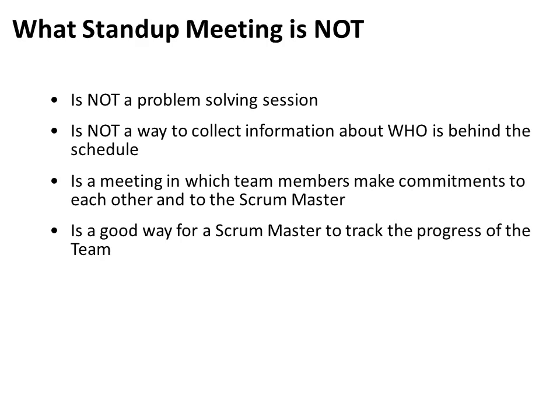So we talked about what a stand-up meeting is, but let's talk about what it is not. It's not a problem solving session. If there is an impediment, you should just note it down and move on. It's not meant to be a discussion session, because this is more of updating each other so that there is proper coordination between each other. If there's a problem that needs to be solved, that would have a separate meeting, and you don't want to waste everyone's time in that.